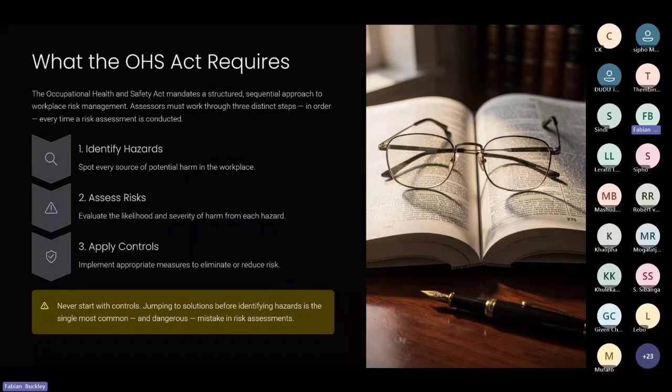So what we advise them is that we need to sit together as a team, as we did with the committee with the method statement. We create a committee, and you as the safety professional or the risk assessor, you would facilitate the process with the team. My advice is always to extract the information from the method statement for the various activities that are being conducted. Add that into your left-hand column for your activities on your risk assessment template. And then from that, you would sit together and start deriving your hazards, your risks, and then your risk evaluations from your inherent risk and your residual risk after your controls. So once the controls are in place, which we'll be running through shortly, you will then be able to facilitate the process in a much more professional manner.